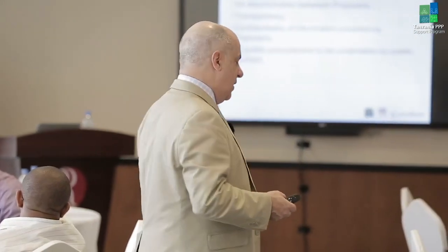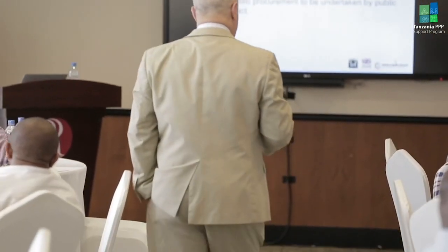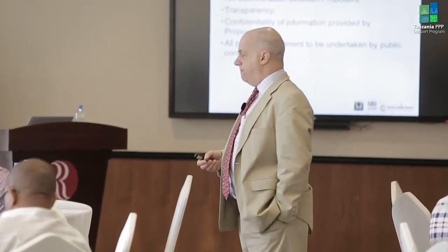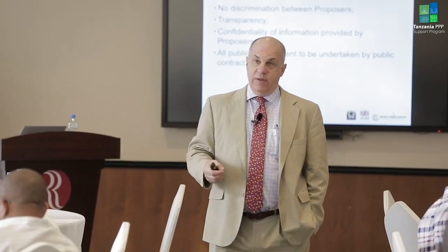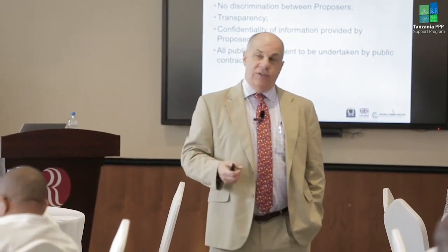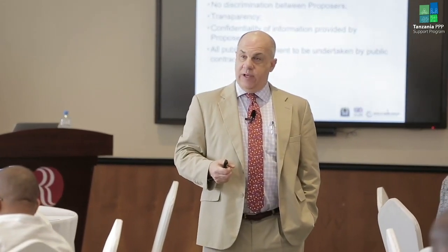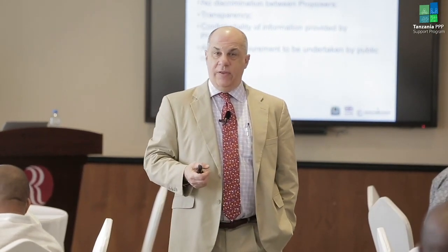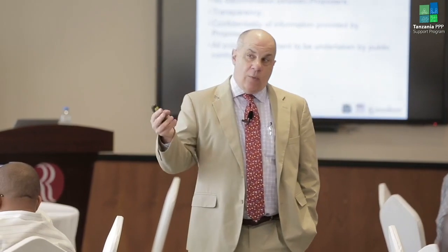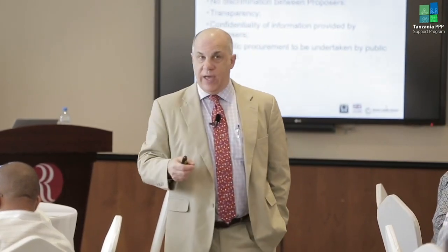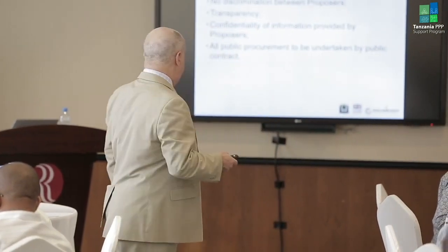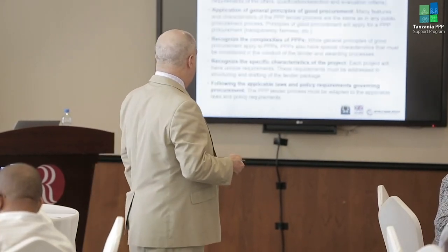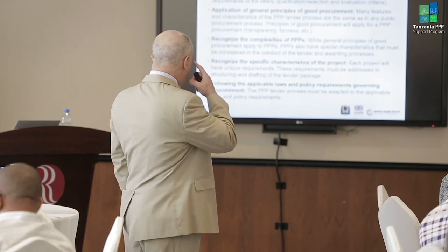You may ask them, in terms of your due diligence, when they submit the proposals to provide financial statements, things such as their balance sheet, for instance, perhaps income statements. So you're going to get to look at their financial health. Well, they probably don't want their competition also looking at that. So there's confidentiality issues. And obviously we're going to use a contract here.